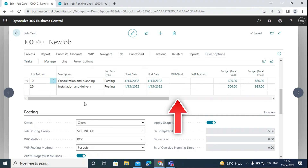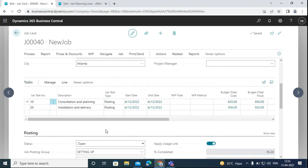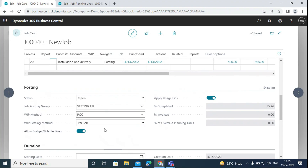We now have an option to calculate WIP. As the job progresses, materials, resources, and other expenses are consumed and incurred. WIP, or work in process, is a feature that enables you to estimate the financial value of jobs in the general ledger while the jobs are still ongoing. It is important to keep track of all expenses, resources, and materials consumed in the job before it is completed, as the project will last much longer in reality. After the job is completed, we can transfer the work in process entries from the balance sheet to the income statement.